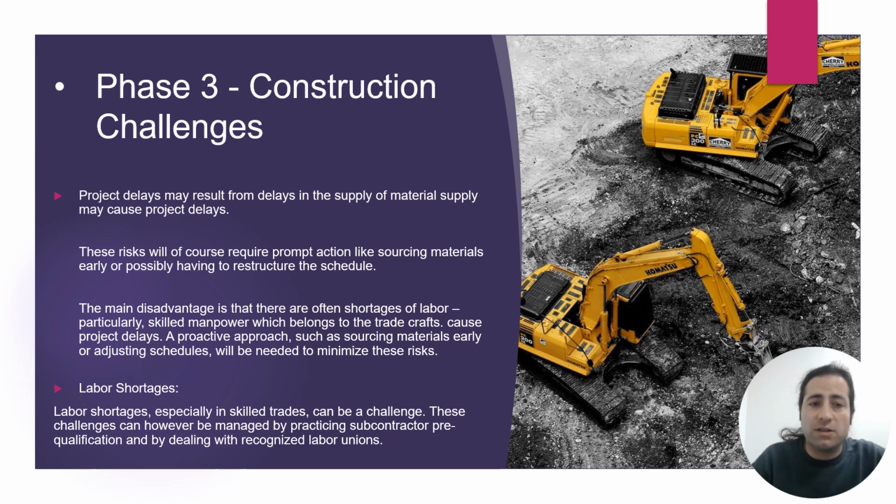Another disadvantage is that there are often shortages of labor, particularly skilled manpower belonging to the trade crafts, which cause project delay. A proactive approach, such as sourcing material early or adjusting the schedule, will be needed to minimize these risks. Labor shortages, especially in skilled trades, can be challenging. These challenges can, however, be managed by practicing subcontractor pre-qualification and by dealing with recognized labor units.